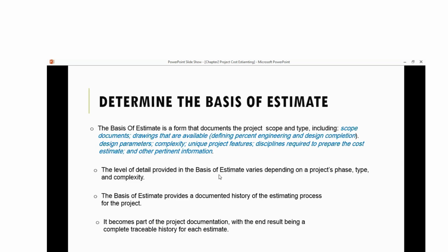So as long as we progress and elaborate into the project, the basis of estimates will vary. So at a glance, I might estimate a feature. It might take 10 hours. Later on, when I go deeper in estimating, decomposing it, I find that it requires 15 hours to be done. So the more we progressively elaborate, the more the estimates will become accurate. As well, I can use, as stated, a top-down estimate in which I can benchmark to a historical project of similar scope and measure accordingly. So all of these are being set into documentation, right?